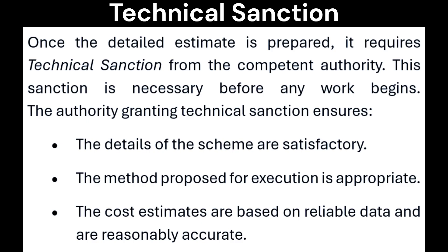Once the detailed estimate is prepared, it requires technical sanction from the competent authority. This sanction is necessary before any work begins. The authority granting technical sanction ensures that the details of the scheme are satisfactory, the method proposed for execution is appropriate, and the cost estimates are based on reliable data and are reasonably accurate.